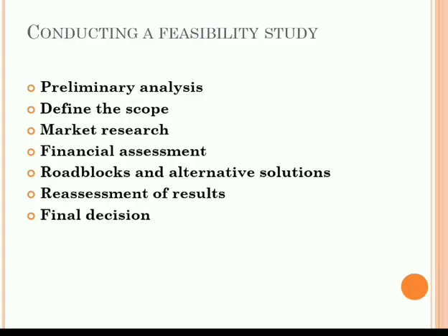While conducting a feasibility study, there are different steps. First one is to conduct a preliminary analysis. In this, we begin by outlining a project plan. One should focus on an unserved need, a market where the demand is greater than the supply, and whether the product or service has a distinct advantage or not. Then you need to determine if the feasibility factors are too high to clear or not, that is, too expensive or unable to effectively market, etc. All these things we have to consider under a preliminary analysis.